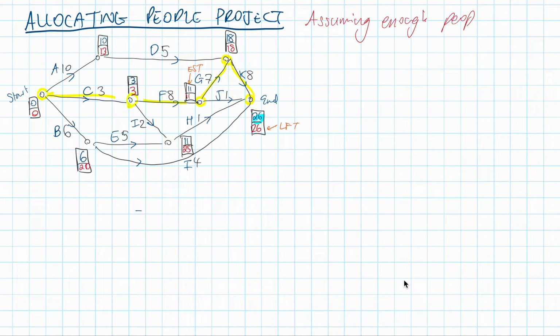At the very start, what jobs can we start off with right away? And sorry, that writing is terrible. There's no excuse for that. Just find it hard to write on these iPads. So we're assuming we have enough people working on the job. Now, I'll show you what I mean. Let's say we start at the start there. Now, optimally, what jobs can we do right away? We can do job A right away, job C right away, and job B right away.